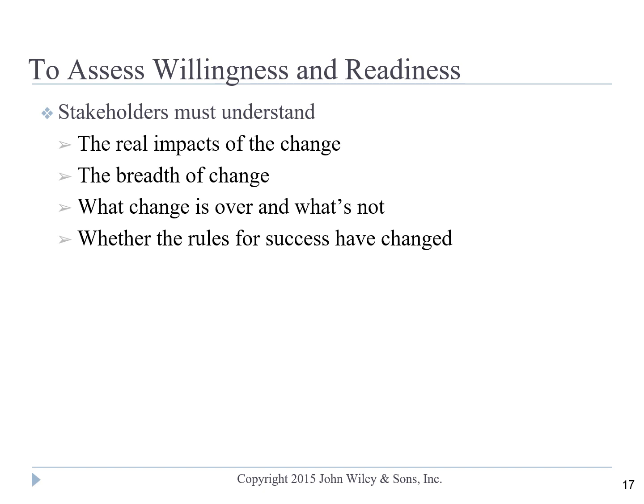As the organizational change is communicated to the stakeholders, we assess the willingness and readiness of the stakeholders. The communication of change needs to be very clear about the real impact of the change, the breadth of the change, and when the change is over. How would we know when the change is over?